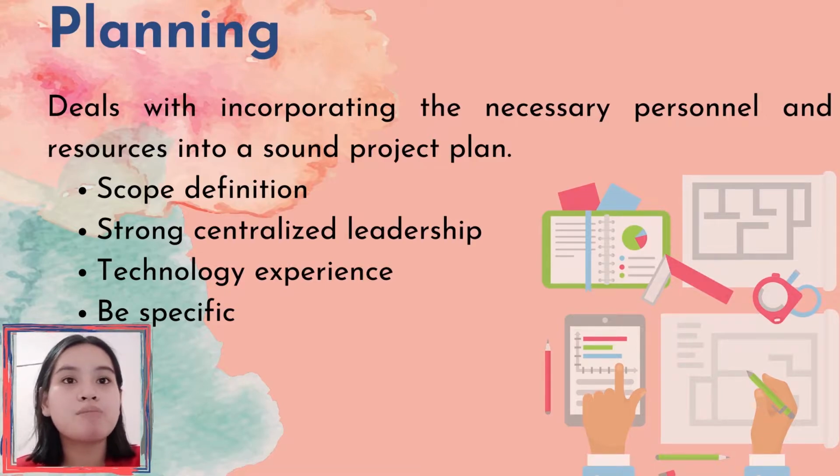Last is be specific. Project plans should be as specific as possible to accurately determine budget, time, and resource needs. Examples of specifics include assigning resources to milestones through a work breakdown structure, budgeting for the logistics of bringing in outside consultants and team members from satellite locations, and having detailed requirements for each milestone.